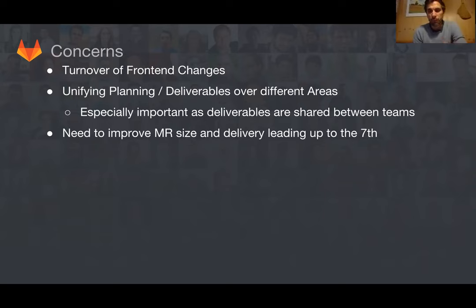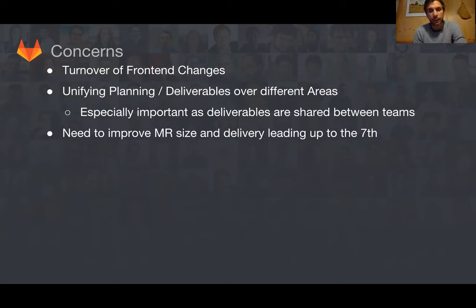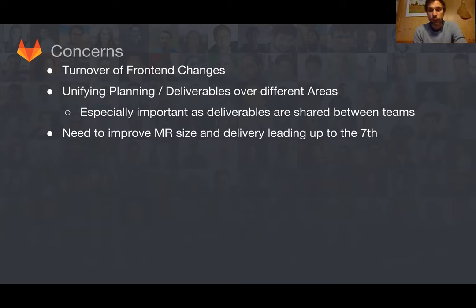The other thing we will see in the future, especially now with the split of the two teams, is that we need unified planning and deliverables. There are already a lot of discussions going on between project managers and in the channels. This is especially important as the front-end AC and DC teams have focuses from their areas, but on the other hand we are sharing a lot of deliverables. If a deliverable is not finishable, we can pass it over to the other team if it has available resources — which already happened in this release cycle. It's simply about having the same format of planning and deliverables across all the different teams.